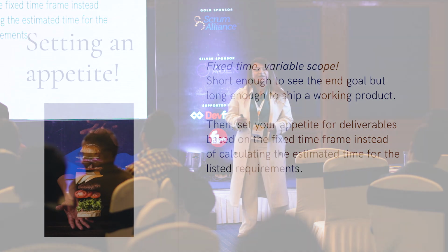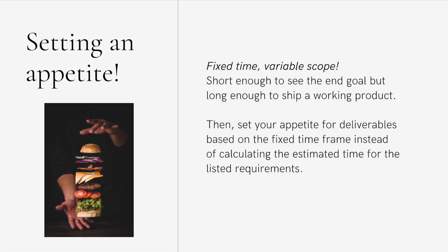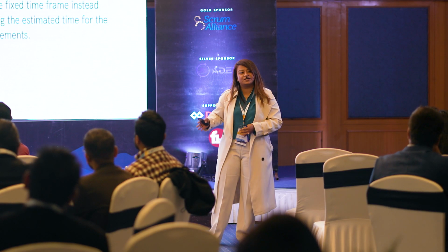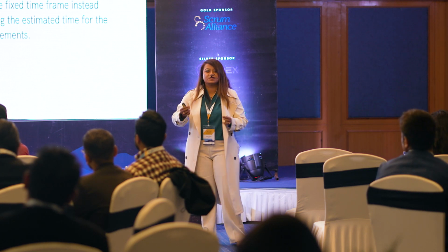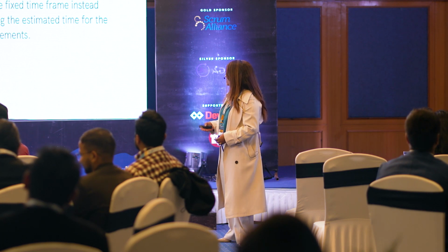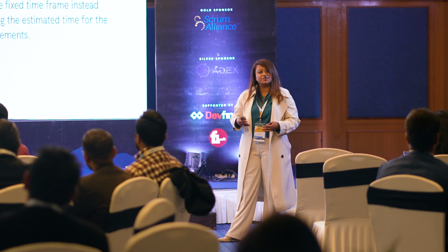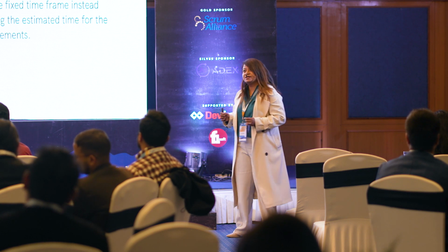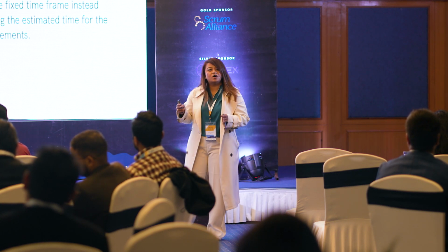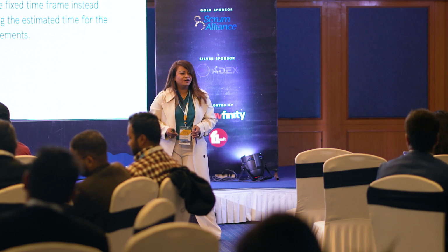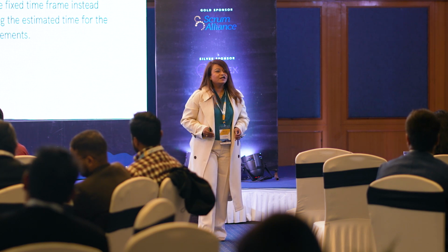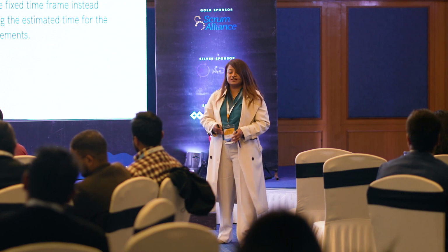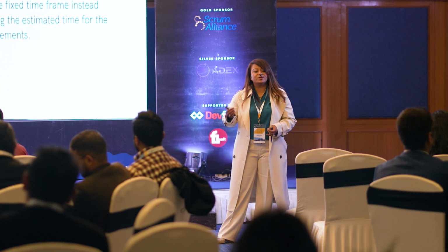It's basically setting up your appetite. So normally what we do is we take a chunk of requirements and then we decide how much time it's going to take based on the requirements, based on what you have to do, the integration and all of that. Instead, let's reverse the process now. Let's keep a specific defined time frame. The time frame should not be so long that you don't know where the end of the road would be. But then again, it should be short enough that you can actually roll out a valid product. So you define the time frame and then you scope out the requirements accordingly.